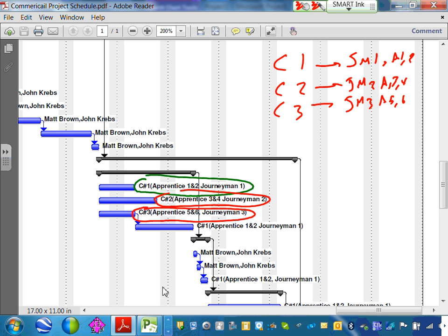So do me a favor, can you guys see how all these tasks started at the same time? Do you see why they started at the same time? Now, do you think crew 1 should wait for crew 2 to finish? If you assign them properly, you put them in a way they're working on 2 different things so they don't step on each other. Long story short, Alex, this is correct, Alex.